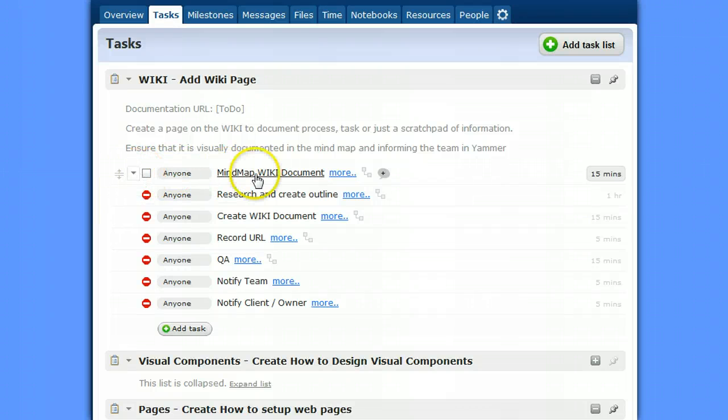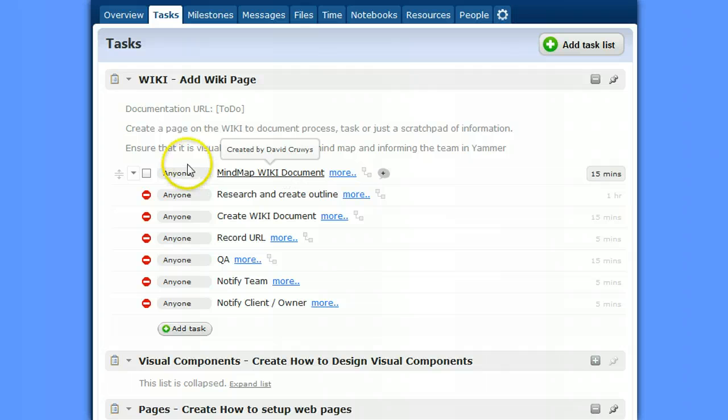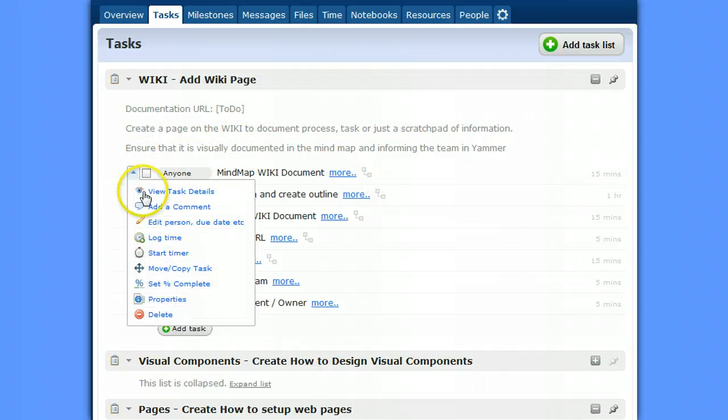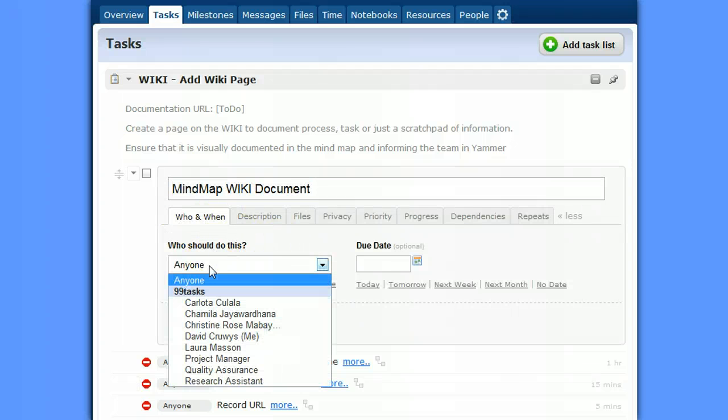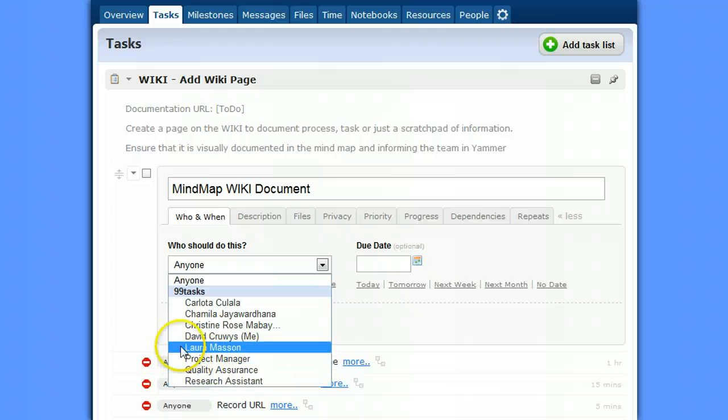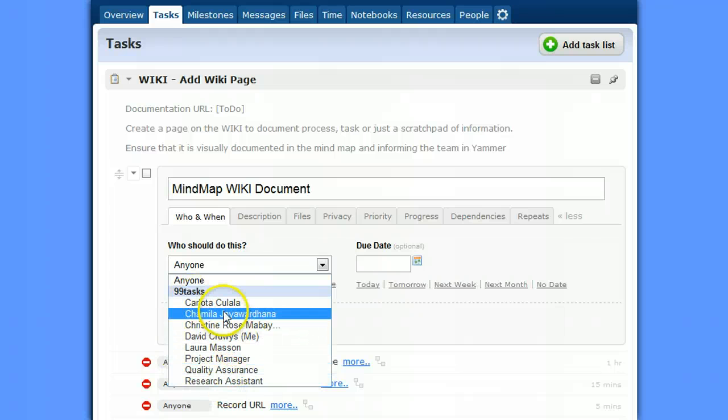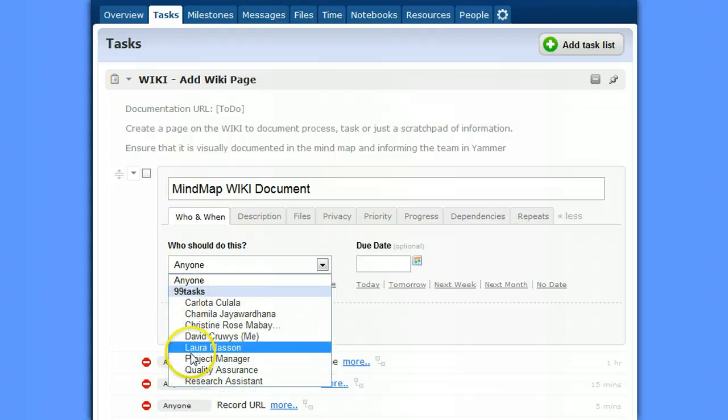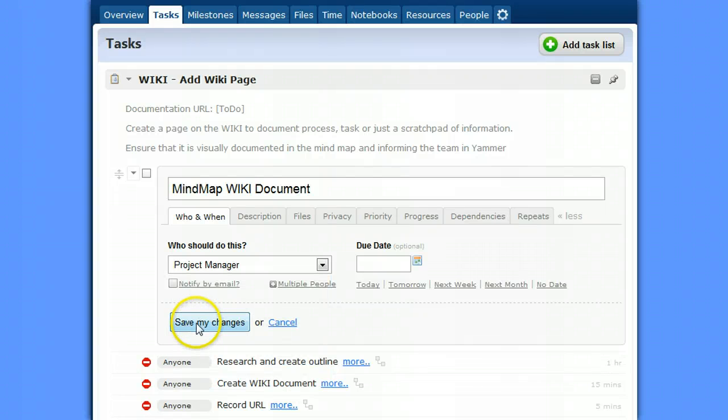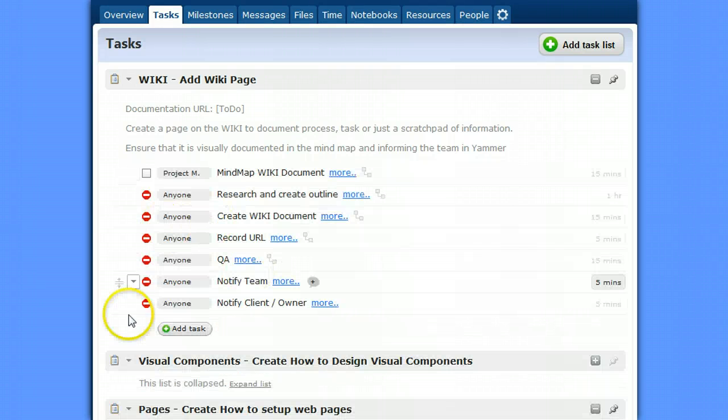And we'll go, the mind map would usually be done by the project manager. So if we go into here, Edit Person, and we'll select who it's going to be. And you can see I've created an artificial user called project manager and made them available within this project. We actually have more users, but these are the users that make sense within this project. So project manager, save it.